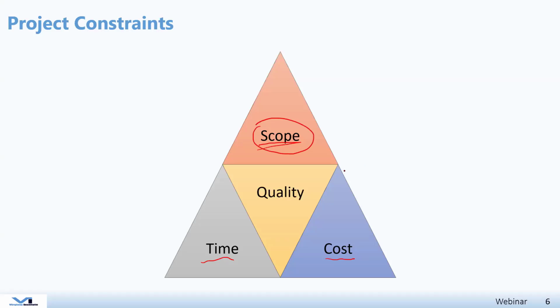So the idea is not only about managing the project scope, time, and cost. Sometimes quality is more important than time and scope. Sometimes cost is more important. It depends really on the nature of your project. So instead of having the triple constraints, which is basically scope, time, and cost, we are nowadays moving more towards what we call competing constraints, because these constraints will be competing with each other. And as a project manager, you need to learn how to make trade-offs between these constraints. And to do that, definitely you need to be creative, and you need to depend more on your right brain, which has to do with flexibility and adaptability and such.